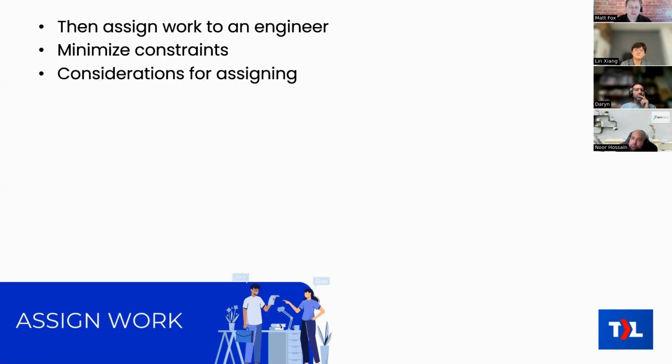In terms of considerations for which tickets you actually want to assign, you want to be looking at things like, do they have an approaching due date? If the due date is approaching, that would be a priority to get assigned to somebody. You also want to be thinking about the milestone as a whole. Do we need to be delivering a whole milestone soon? And does this ticket block any other work within that milestone? If so, then definitely that's one that you want to get assigned earlier rather than later. You're also thinking about the whole project portfolio. Which projects are we running right now? Which are the big projects that we need to be doing a lot on because it's a major project? Even which customers are particularly important to you right now? Those are some of the considerations about which tickets you want to get assigned and when.